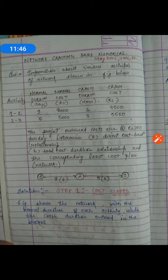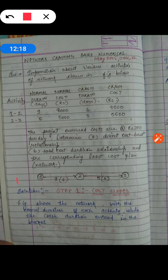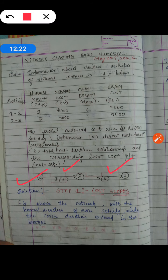The project overhead cost is 300 rupees per day. Overhead cost means indirect cost, which I explained in lecture 2 or 3. The question asks us to determine: (A) the direct cost-duration relationship, (B) the total cost-duration relationship and the corresponding least-cost plan network. The network is given with 2 activities: 1-2 and 2-3. Activity 1-2 has a normal duration of 9 days and crash duration of 6 days; activity 2-3 has normal duration of 5 days and crash duration of 3 days.